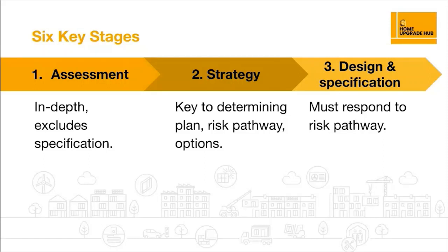And this is a very important point because it will determine what happens next. So all projects at this point are going to be triaged by a coordinator according to the level of project risk, and then that will determine how much specialist expertise you're going to need for the design and the installation.